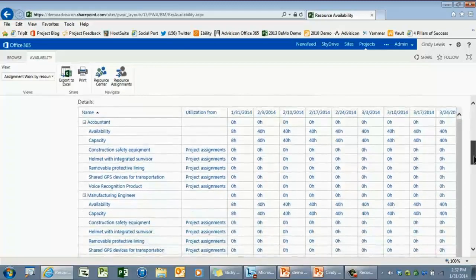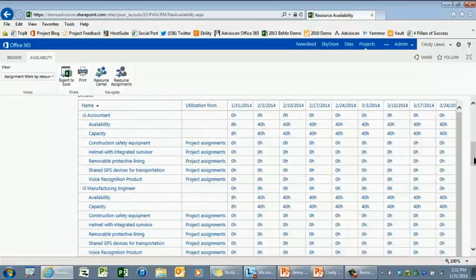Throughout this group that you'll see down below, you'll see availability versus capacity. So do you know, is positive number good or bad? Good. You'll see in a few moments here, I'll be scrolling down showing you some negatives. Negatives means you're overbooked. Has that ever happened?